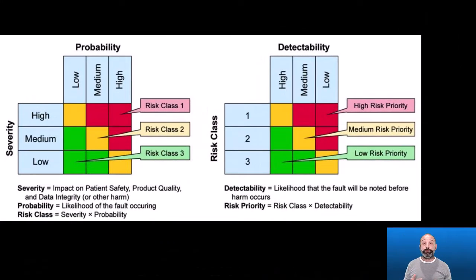The first step in implementing risk-based testing is to configure the risk assessment feature into your system. And to do this, you have two options. First, you can implement the feature manually using custom fields and Jira automation, or you could make use of a third-party app from the Atlassian Marketplace. For this demo, I went with the first option and built a GAMP 5 risk assessment using custom fields and automation. Let's look at that first.